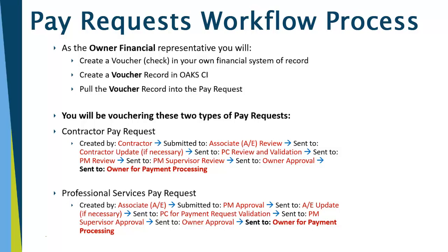You will be vouchering these two types of pay requests: the contractor pay request, which is created by the contractor, submitted to the architect for review, can be sent back for contractor update if necessary, sent to PC review and validation, project manager review, PM supervisor review if necessary, then to owner approval, and finally to the owner for payment